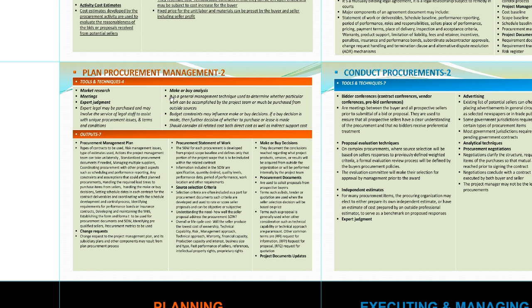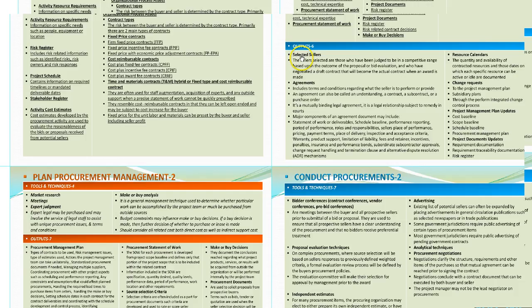I might give the plumbing work to a plumbing company, or a mechanical job like air conditioning to a mechanical firm. So all this goes under procurements and planning procurements, planning to make or buy the piece of work that we are planning to do as an organization. So that goes in plan procurement.